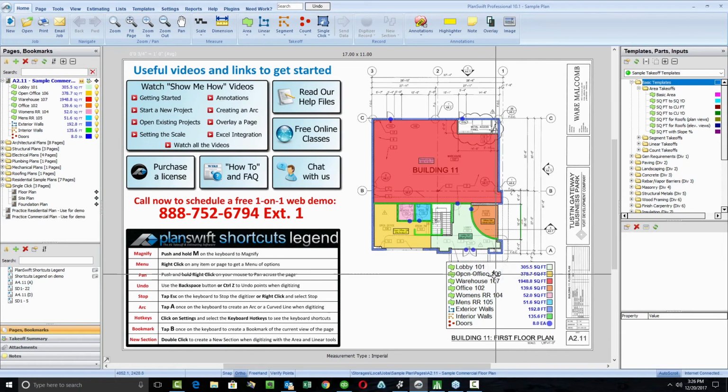Each of these areas also uses concepts like the assemblies or the items, and you can actually drag these items or assemblies into the takeoff or the measurement that you've generated. Here, for example, we've got square footage for what we would consider to be a standard warehouse trace or area. And when we're dragging in the components for the warehouse, it'll populate the number of items based on all the measurements for the red traced area here.